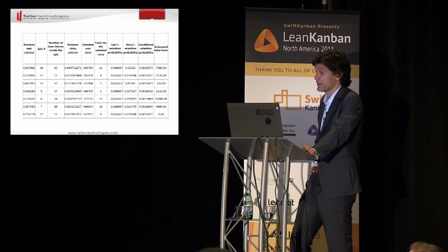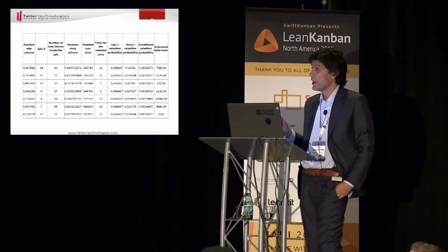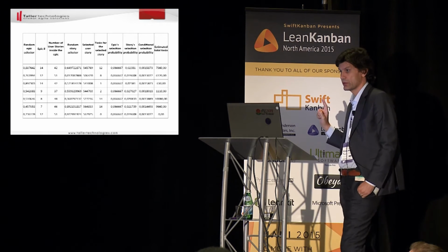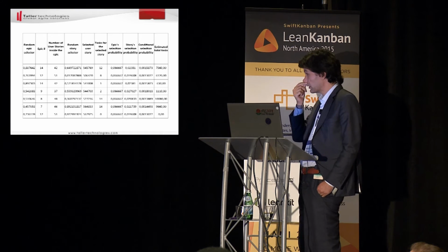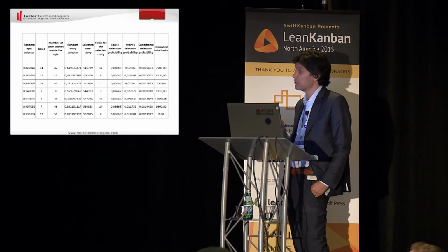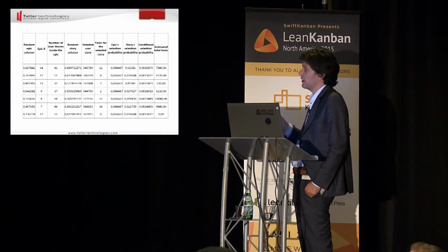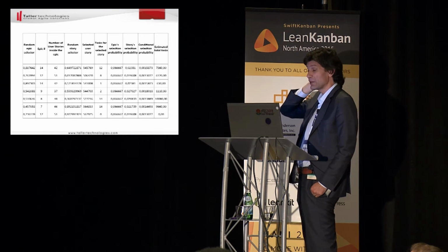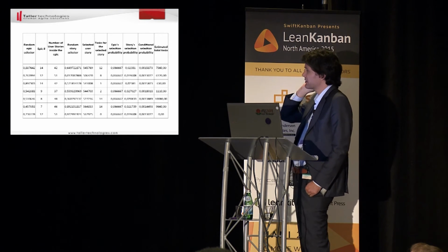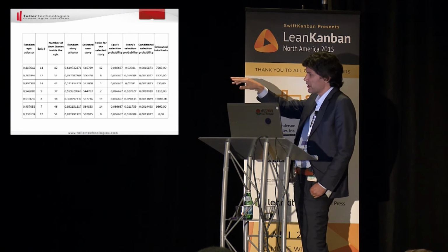And then we generated a random number to pick only one of those 42 user stories. And then we analyzed only this user story, and they established that this particular story had 12 tasks. And then using the formula, the first estimate of the total number of tasks for this project was 7,500. So we do it the same.